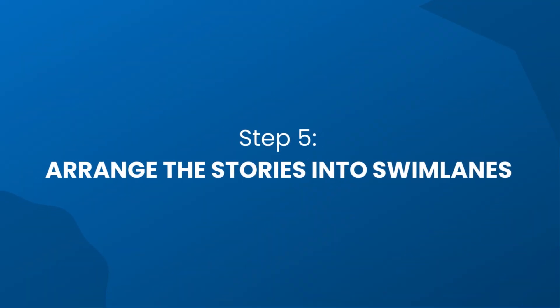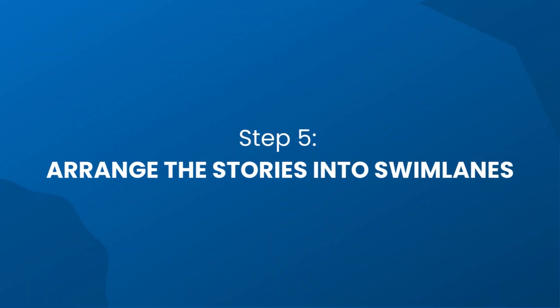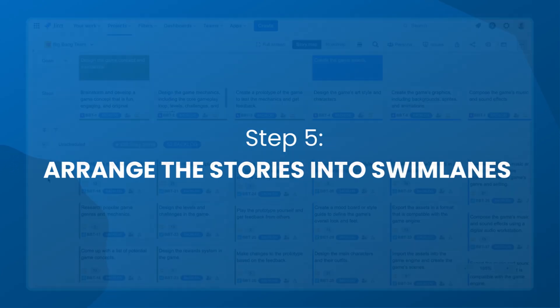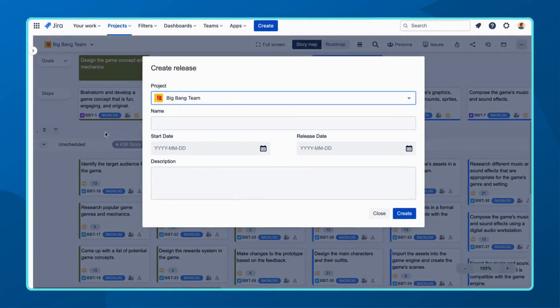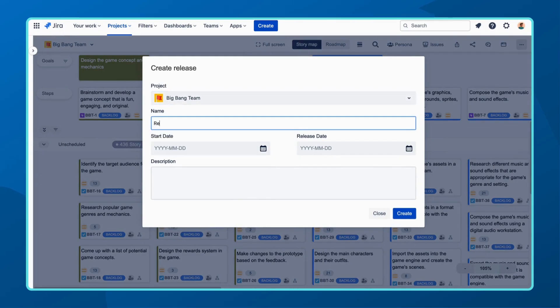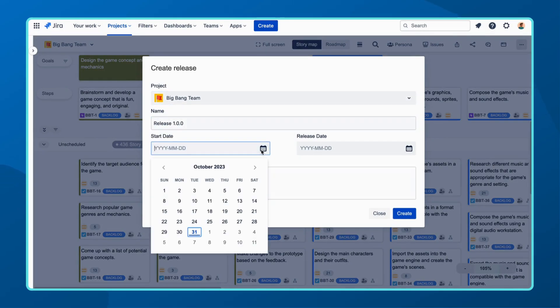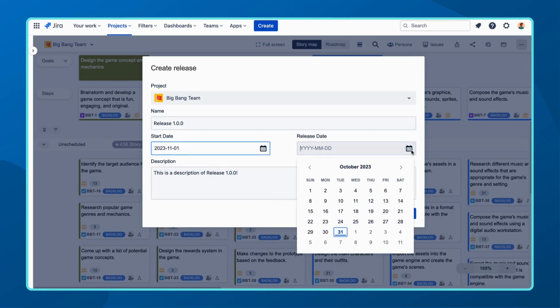Step five focuses on arranging your stories into swim lanes after estimating the effort for each story. It becomes easier to select the set of stories that should go into your releases or sprints. This ensures that your team is focused on delivering the most important user stories in each sprint or release.